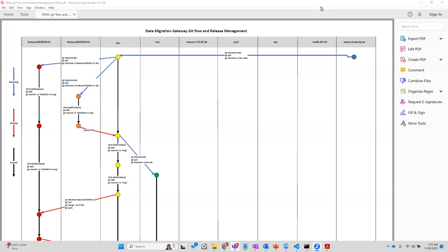There will be 2 week sprints right now. Okay. And generally, let's say 6 sprints, each sprint of 2 weeks, that is 12 weeks. 12 weeks is how many months? Around 3 months, which is equal to 1 quarter. That's what I said, right? 3 months.